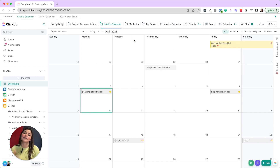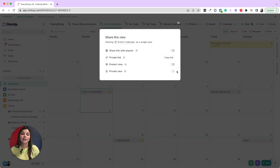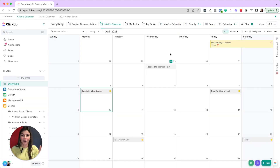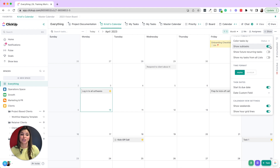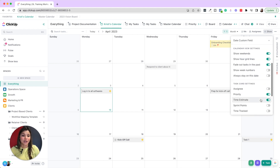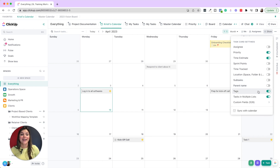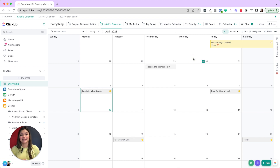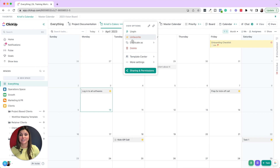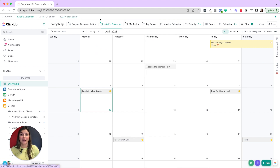For these calendars, we create a calendar view and then add a filter where the assignee is that person. You can create this for them if you have a small team. If you have a larger team, we recommend having them create it and then making it a private view so not everyone has access to all the calendars. We also make sure to show subtasks, priority, and tags — those are the main things we recommend on this calendar view. Then we have team members favorite it so they can always view it easily. As soon as you start your day, you're going to your calendar or your dashboard.